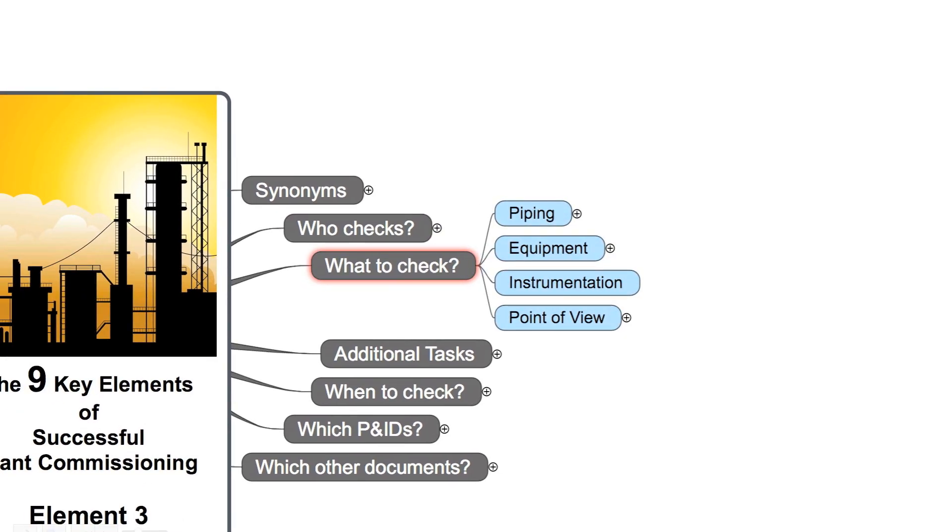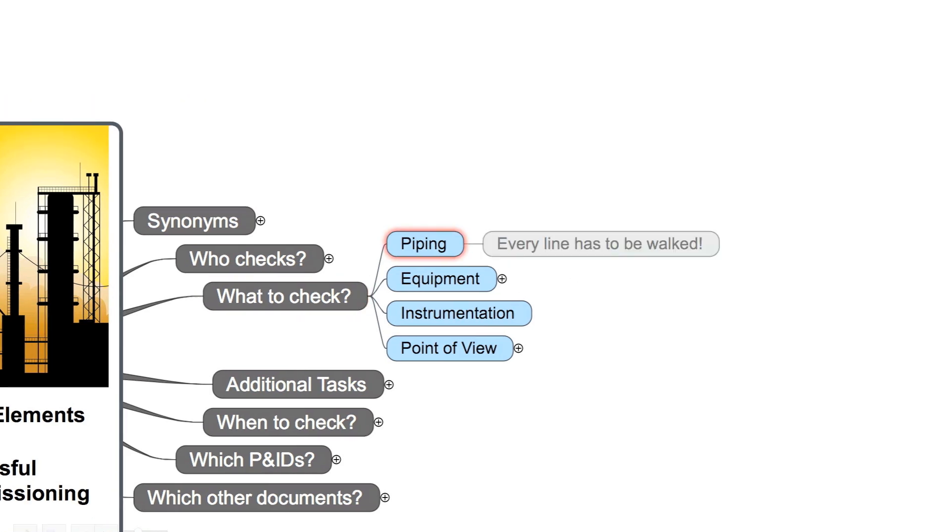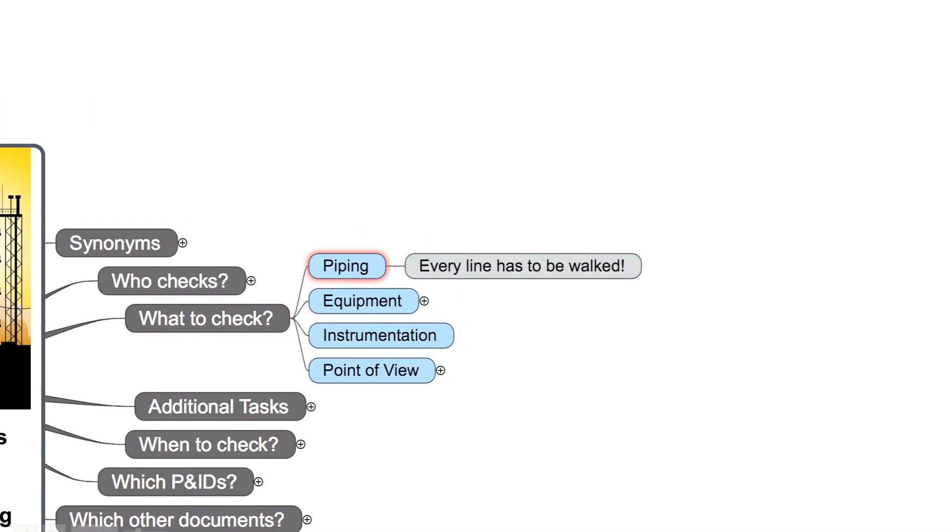Which items have to be checked? We have to check all the piping. Here it is very important to walk each and every single line.